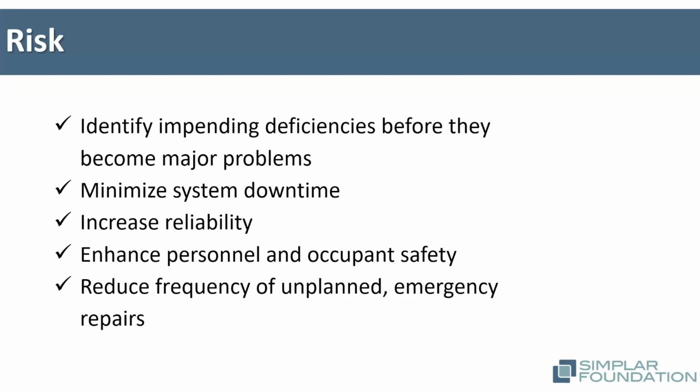So those unplanned emergency repairs, on average now, cost up to 40% more overall when that happens. And so if you want to control a budget, we're trying to connect to the C-suite, we're trying to connect to the CFO here. We're able to save 40% costs on our projects if we're proactive and not reactive.